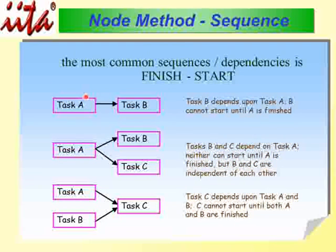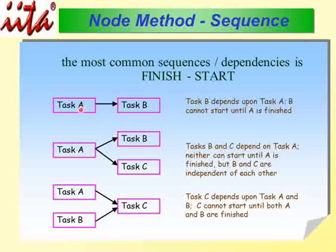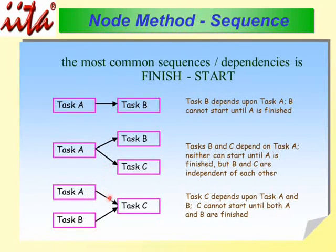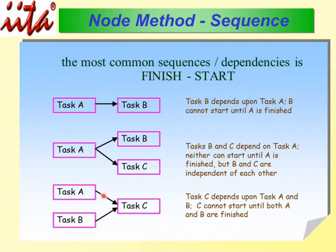There are many other scenarios under the node method, especially regarding Finish-to-Start. Task B depends on A — it is only when A finishes that B will start. Task B and Task C are both dependent and require the completion of Task A before either can start. Similarly, Task C can only start when both Task A and Task B are finished; if only Task A finishes, Task C will not start.